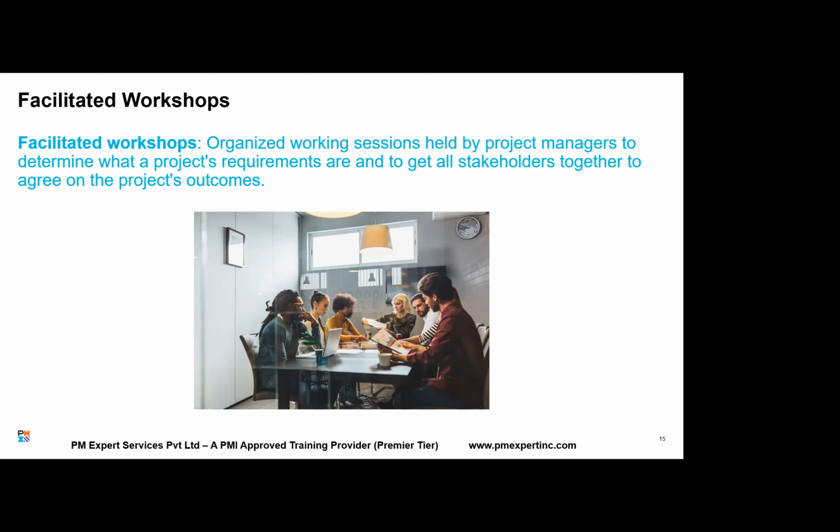Whereas in a facilitated workshop, you don't need pre-qualified stakeholders. The stakeholders come together to agree on the project's outcome. Maybe the focus group might have given a different viewpoint, and then focus groups can be followed by facilitated workshops to arrive at an agreement.